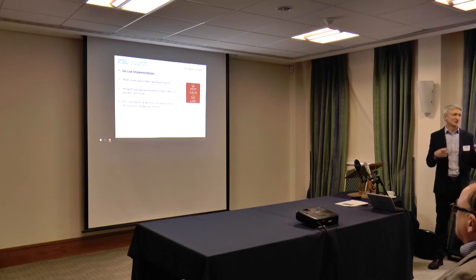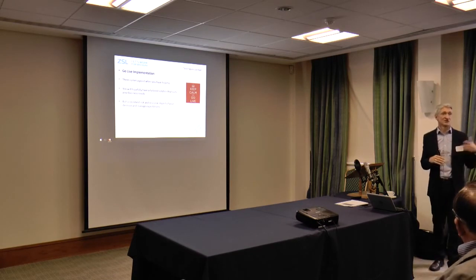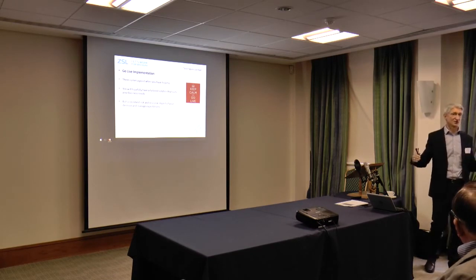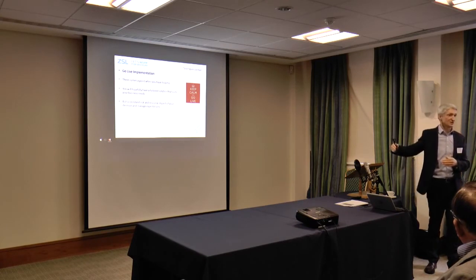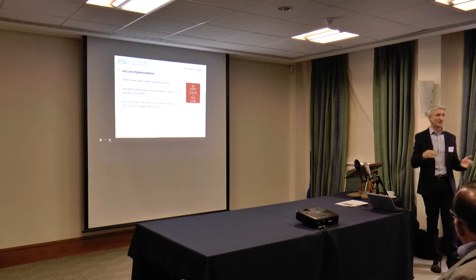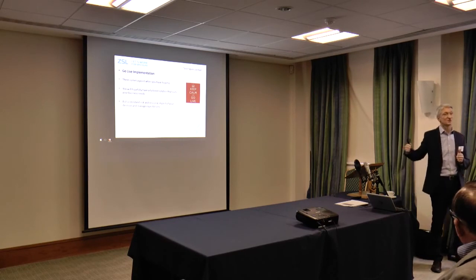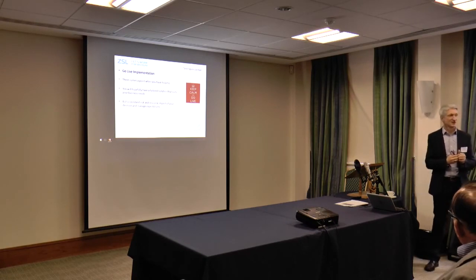The dilemma, just as an example, is that we had to go live in February, because at the beginning of February it was then half term, 2 weeks after that. Then after half term, it was an early Easter. For us, we had to really have everything up and ready for February half term. Originally, we had thought of going after half term, but then we suddenly realised that because Easter was much earlier this year than normal, that didn't give us enough window to be comfortable. So we actually had to bring our dates back by a couple of weeks, and that did hurt us on some of the testing stuff.